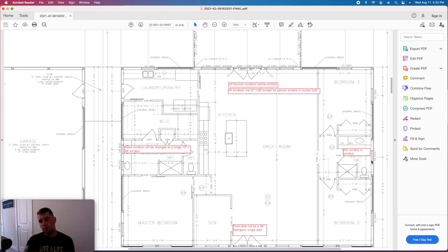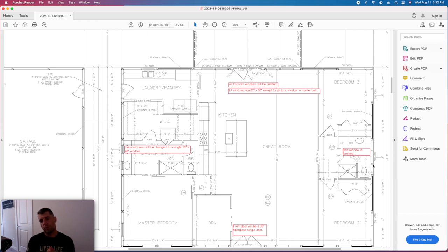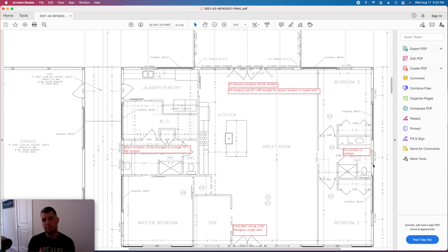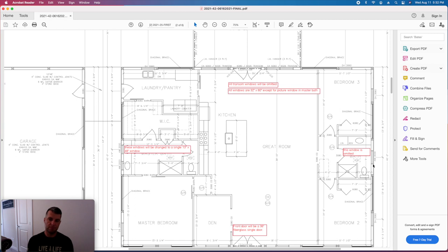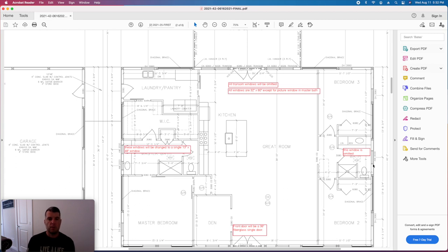So that's what we did with the windows. The bathroom, we felt that this window was really not needed, so we're going to omit the window in the guest bath. Just, again, to save a little bit on the budget, and we're probably saving five, six, seven hundred dollars, because that was a three-foot by three-foot window. So not as expensive as the big ones, but still helps us out with the budget.